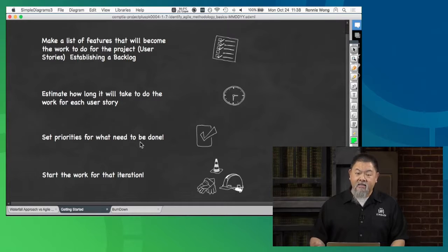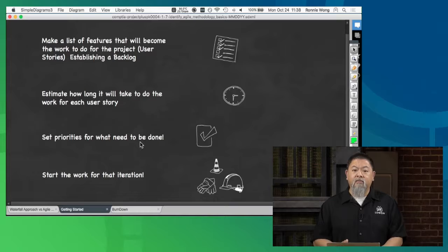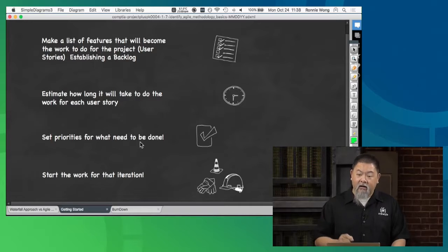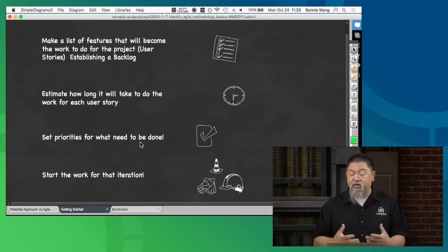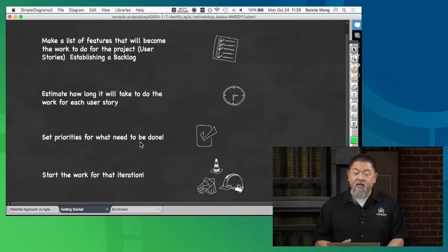So that way when somebody asks, Cherokee, what are you working on right now? She doesn't have to go, well, let me tell you the technical details behind it. She can give a 1 to 2 sentence summary that now sticks in her mind of here's what my goal is going to be. Okay? We also want to make sure that the backlog that we have is normally designed for our particular sprint as well. Okay? And so usually along with the idea of the sprint and the prioritization, there is normally an estimate of how long that task is going to take. And then, of course, the deliverable we're trying to accomplish, the user story that we're trying to accomplish.